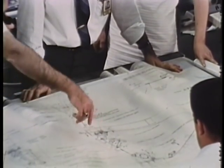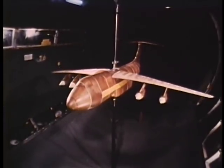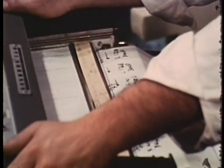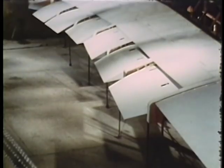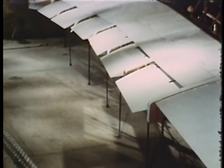You see, we started out with a high lift system. Then, rather late in the game, but as a result of continuing wind tunnel testing, Lockheed engineers found they were becoming critical on the 3-engine climb-out. They wanted to trade off some lift capability for some freedom from drag to improve that climb rate. So they shifted to a Fowler flap system, which also changed the slat design. To accommodate a design change this important, this late, and still meet schedule puts the heat on. And it takes good cooperation all round, as well as good management by primes and subs.